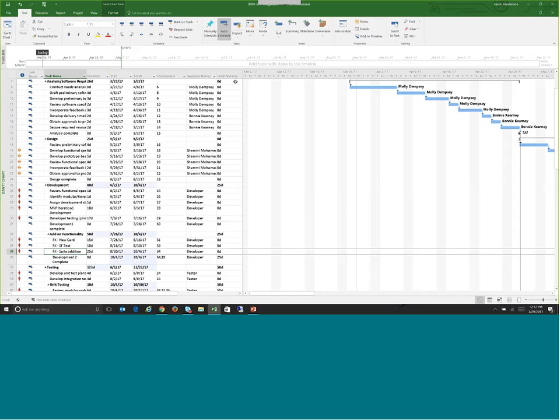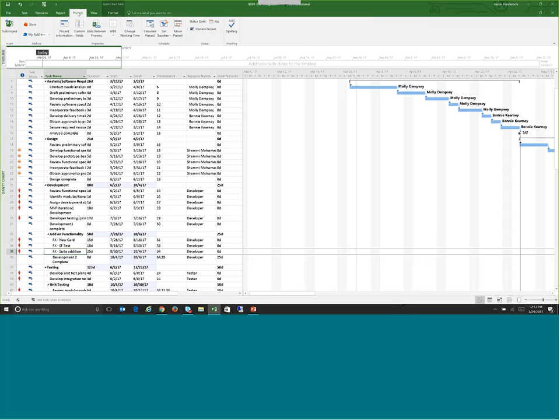The topic specifically that I want to address here is when you want to track your project against what the original plan was, you have to have baselines of your project schedule. So in Microsoft Project, you're actually able to create multiple baselines. The way you do so, if you're familiar with Microsoft Project, I'm sure you've done this before, but if you haven't, on the Project tab in the ribbon, there is a set baseline operation. And I'm just going to stay on the screen and describe things a little bit.